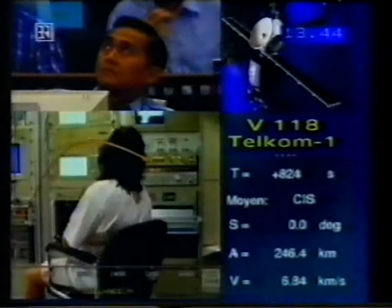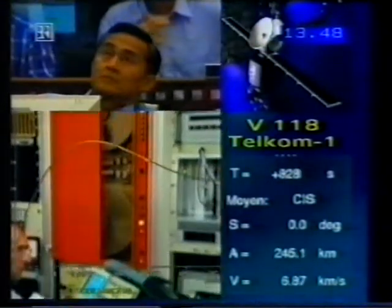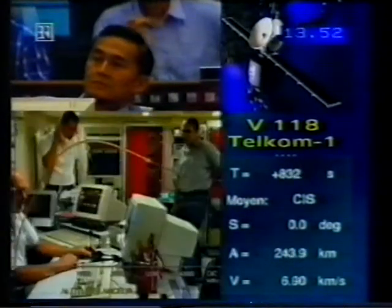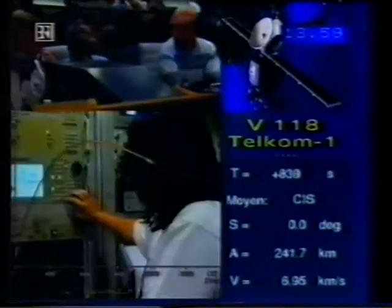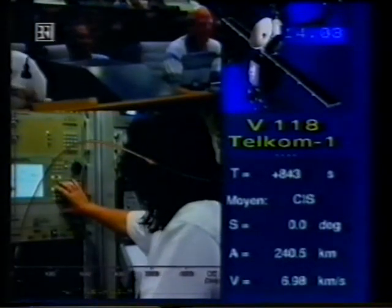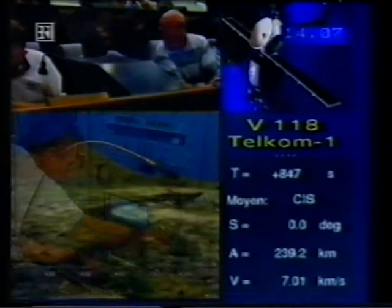As we all know, sometimes spacecraft readiness schedules cause a lot of concern for the manifest, and the launch manifest becomes very dynamic launch planning. Having this extra facility is going to give us the chance and flexibility to process more spacecraft in parallel and to recover from these latent surprises.